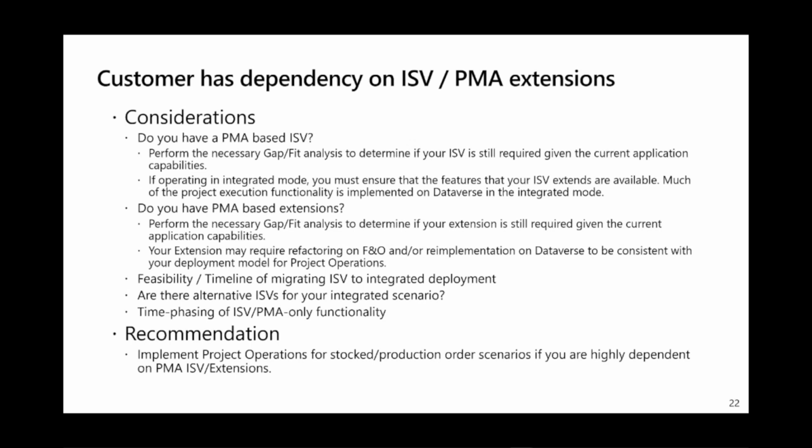In other words, if you can live without that functionality for a while and wait for it to become a standard part of your ISV solution as they refactor to support integrated project operations, then that's great. But you do need to talk to your ISV and understand what they're truly committed to there, with a reasonable buffer. You plan very conservatively if you need to take a dependency on anything in a roadmap, whether it's our roadmap or an ISV's roadmap. There may also be alternative ISV solutions that better fit the integrated scenario and your timelines. So bear that in mind.